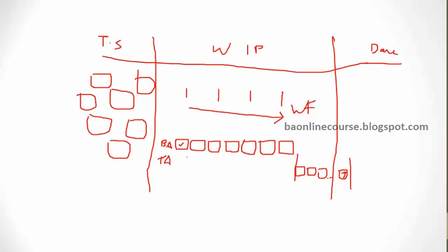But in Agile, we will not wait till all your requirements are captured. So the architect, rather than starting from here, would start from here. On the next day, as and when a requirement is completed, he will start designing it. So this would be requirements 1, 2, 3, up to 7. Instead of starting requirement 1 here, after requirement 7 is completed, he'll start right here. So this means both of them are busy.